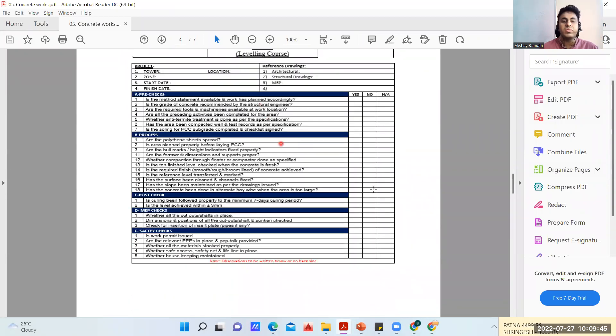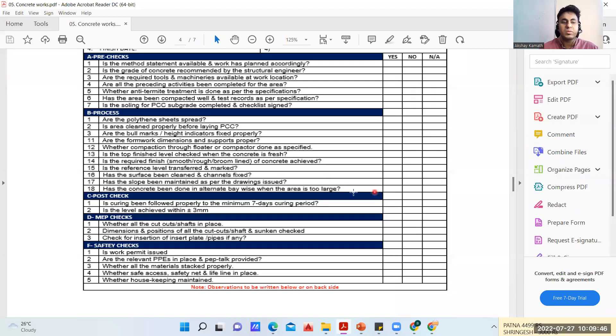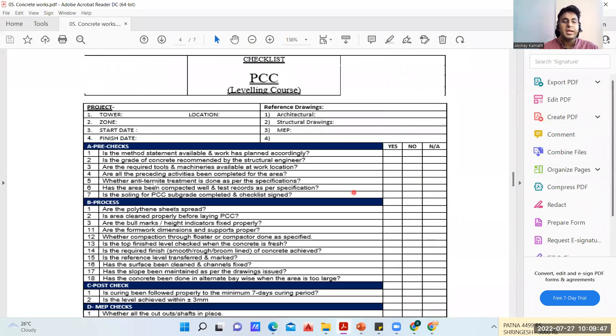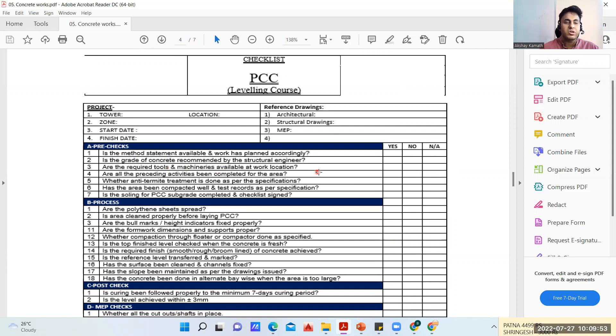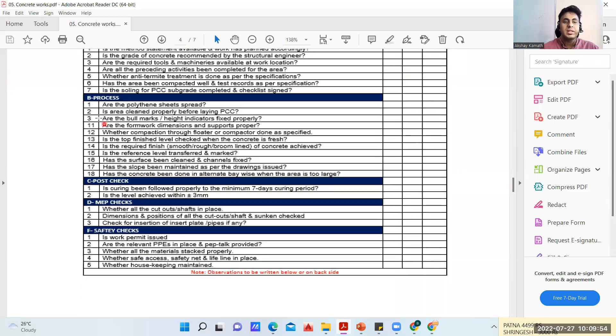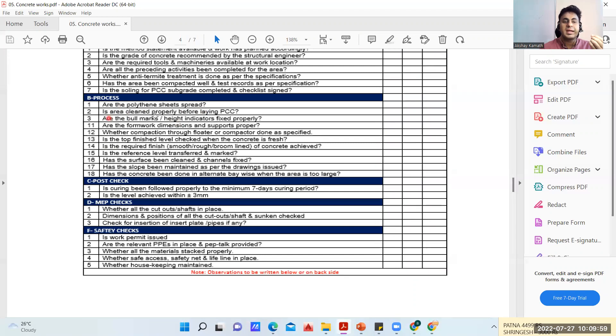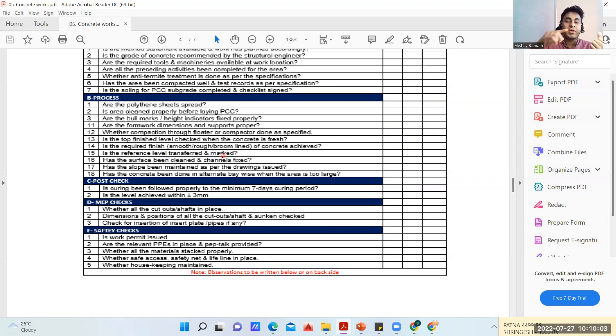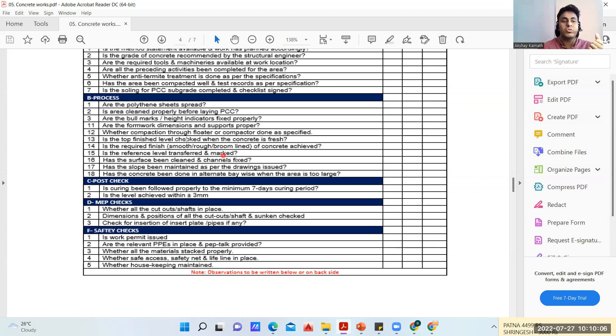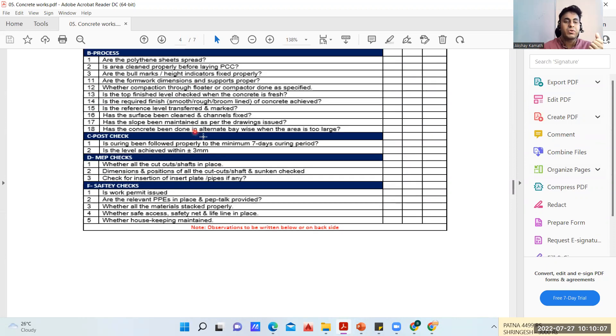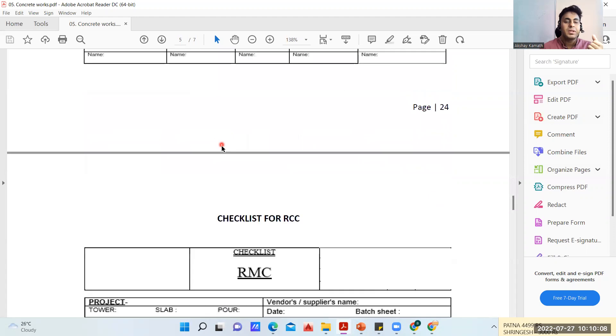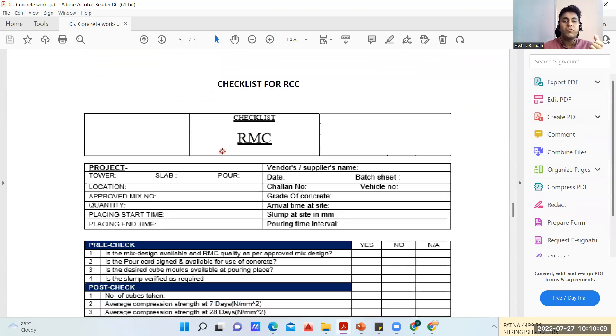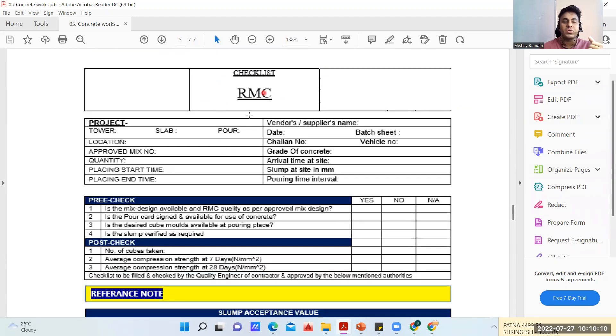The responsibilities remain the same for all your work methodology. Coming to the checklist of the PCC - these are the pre-checks: is a method statement available, are the required tools and machineries available at the work location. At the time of PCC, are the polythene sheets spread, is the area clean before laying of PCC. Is a reference level transferred and marked - we have marked all the levels, what is the top level of your PCC, all those things.